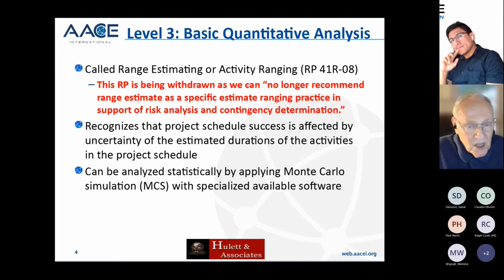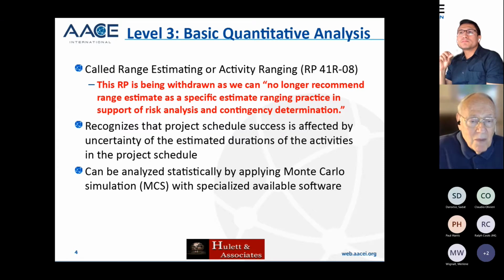Okay, but level 3 does recognize that the project schedule success is affected by uncertainty of the estimated durations, and that it can be analyzed statistically by applying Monte Carlo simulation, MCS, to a schedule of a project using specialized Monte Carlo simulation software.